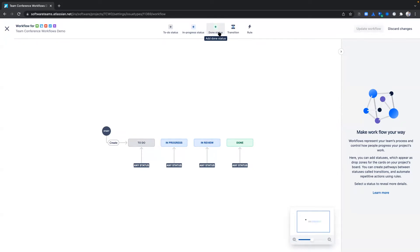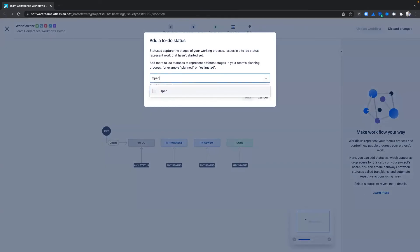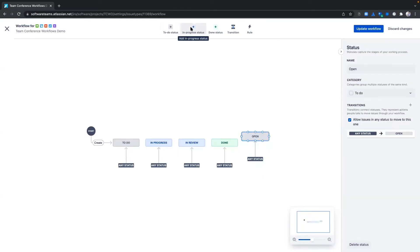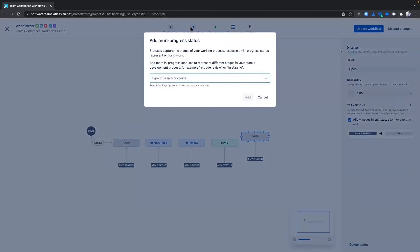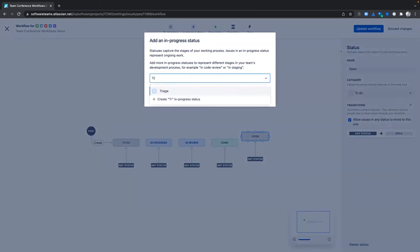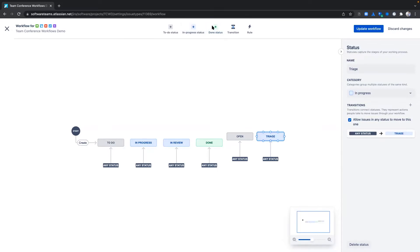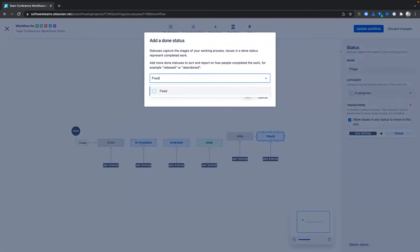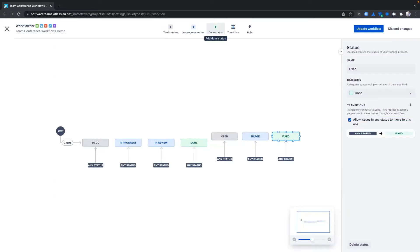Let's now add our desired statuses. In this example, I will create the following statuses: Open with the To Do status category, Triage with an In Progress status category, and Fixed with the Done status category.